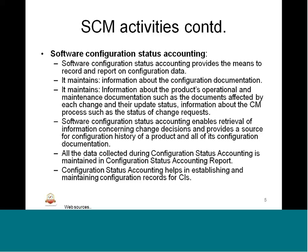There is a frequency — bi-weekly or monthly — at which this report will be generated. This report generation is part of the configuration status accounting report, which collects whatever configuration items underwent changes, updates, and impacts for that particular period. All this information is reported, including configuration status records for CIs.